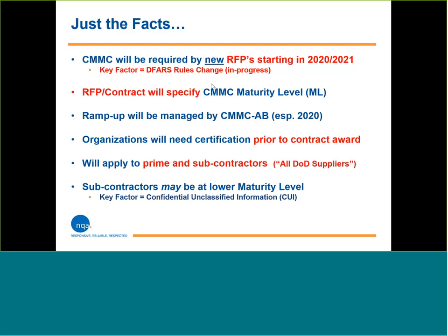And I think the caveat there is, at least initially, there's going to be a resource crunch. So you can't expect to just call up a C3PAO and have an audit next week or even in the next month. You may have to contact several C3PAOs, and the best availability may be several months. So bear that in mind as you think about this. If you do need to pursue this or want to pursue this, build some time into your plan.